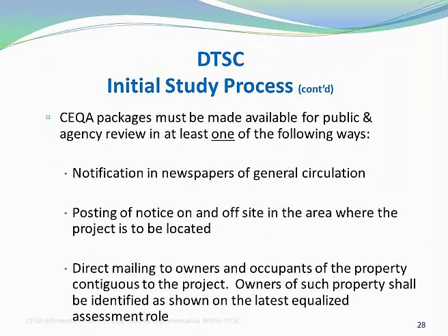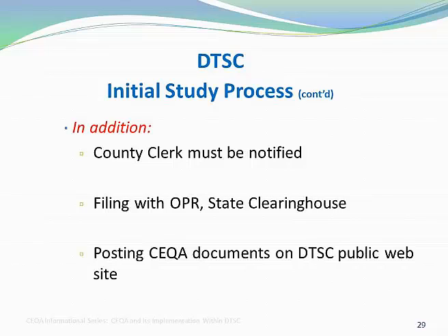The project manager coordinates the scheduling for the public notice with the public participation specialist. At the same time, CEQA has certain requirements for public noticing. And as the slide points out, CEQA packages must be made available for public and agency review in at least one of the ways you see listed. In addition, CEQA requires that the county clerk be notified for each county in which the project is located. The notice is filed with the state clearinghouse, and DTSC posts the CEQA document on its public website.